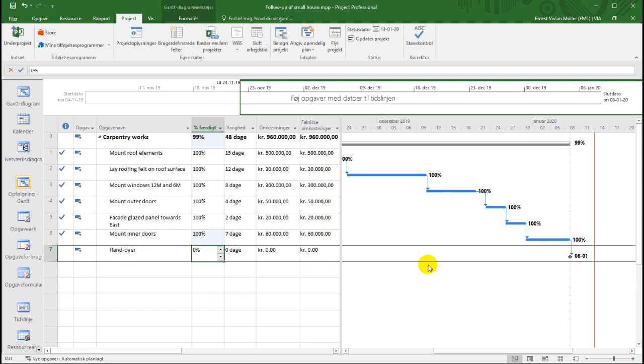The client will not pay the final payment until the handing over is looked at between the architect and the design and build contractor. The design and build contractor, the architect, and the subcontractors will go through the building and make sure that this contract is 100% finished. If there are any shortcomings, the subcontractor will be given, let's say, 14 days to rectify those shortcomings, after which there will be a new handing over procedure.